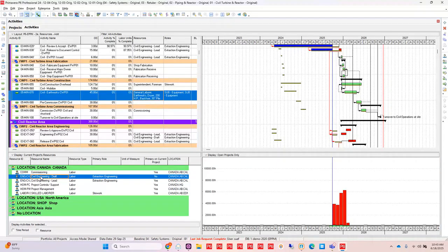And P6 is going to highlight that for me. So it's fantastic. It can help you feel, it can also help you deal with those overloads. It's kind of an advanced topic, but you can set priorities and rearrange that work and hopefully not have that work be bumping into your critical path activities, depending on where they're falling.